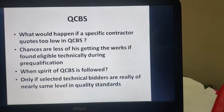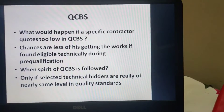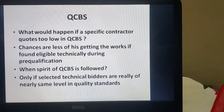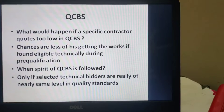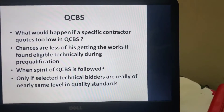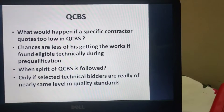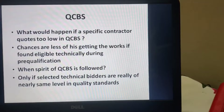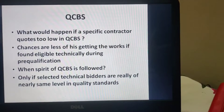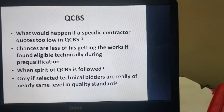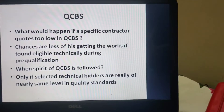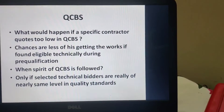What would happen if a specific contractor quotes too low in QCBS? Chances of getting the work are less if found ineligible technically due to pre-qualification. Even if quoting less, if the quality assessment gives him fewer marks, he will not get the work — though if the price is too low, he may compensate for that. When the spirit of QCBS is followed, bidders selected during pre-qualification are on an almost equal base, and QCBS will certainly be a better approach.